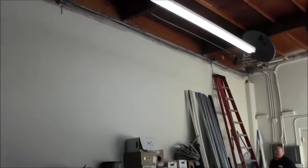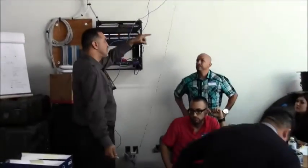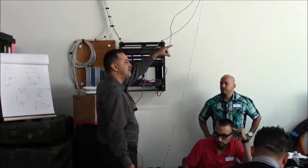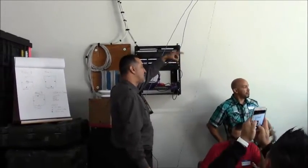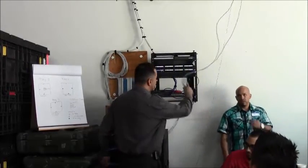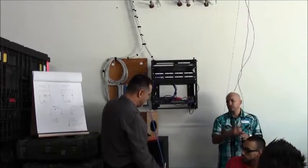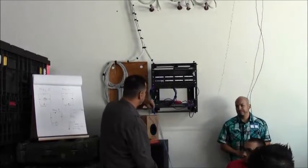Right now he's pulling from the IDF to a station cable. The station cable is going to look like this when we're done. Service loop. Nobody's heard of that before, but a lot of these companies want service loops, which is 5 to 7 feet. So when he pulls his cable, he's going to pull an extra 5 or 7 feet down the wall, and then we're going to do our service loop on this side. Since it's going to this rack, we'll pull enough slack, not over pull it, probably going to the ground and back up to the rack.